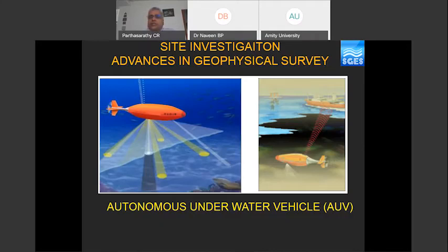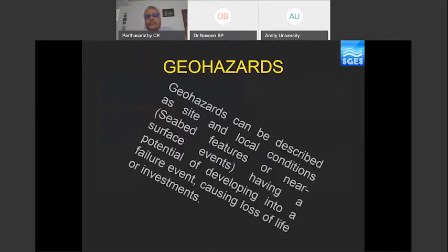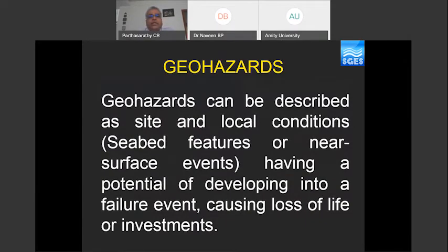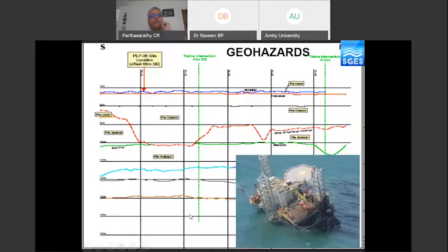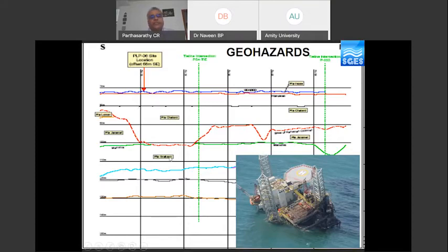Once the geophysical survey is carried out, the next step is to identify geo-hazards — defined as site and local conditions, specifically seabed features or near-surface events having a potential to develop into a failure event causing loss of life or investments. A channel feature itself is a geo-hazard that a borehole alone cannot identify. In the absence of geophysics, if a rig is moved to these locations, the foundations will be in a predetermined failure situation causing distress. If channel features are found, the best option is to avoid them by moving locations left or right.